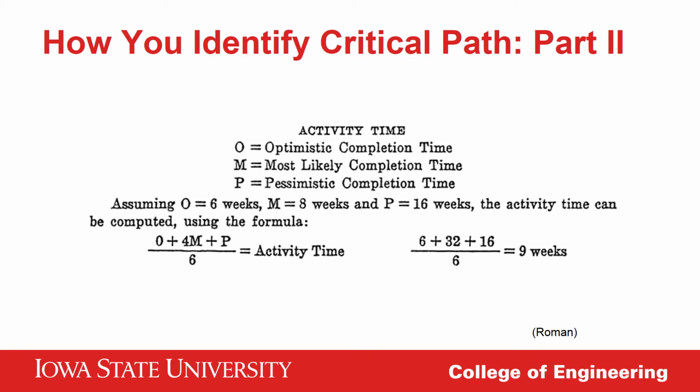This information is then applied to a network diagram, like the one we saw in the previous slide. Again, add the durations of the arrows along each path, and the longest equivalent time identifies the critical path. A strong advantage, in my opinion, of the PERT is the acknowledgement that task durations are not written in stone. They will vary throughout the course of the project. Unfortunately, this also makes including economics for each activity difficult, though there is some software that helps with this analysis.